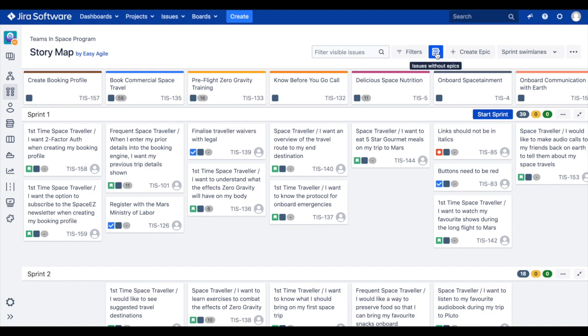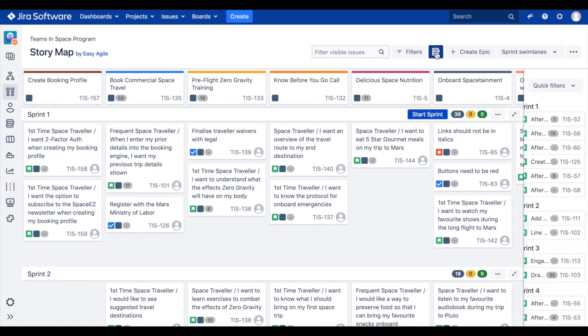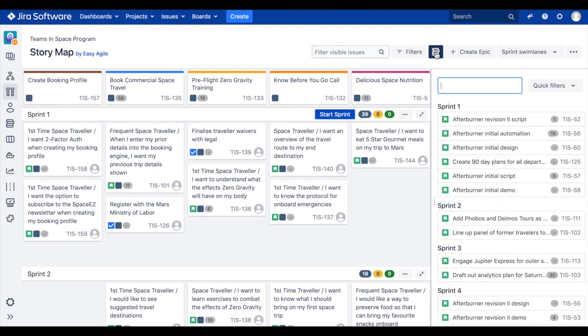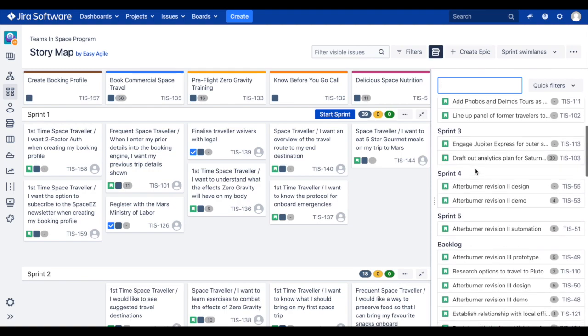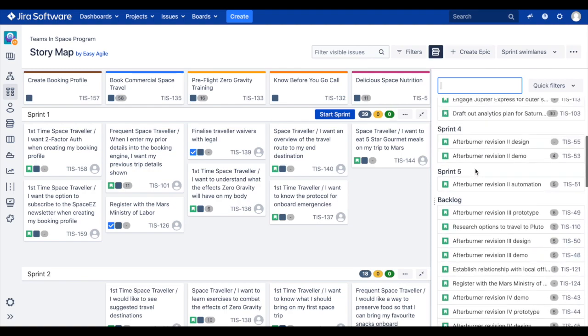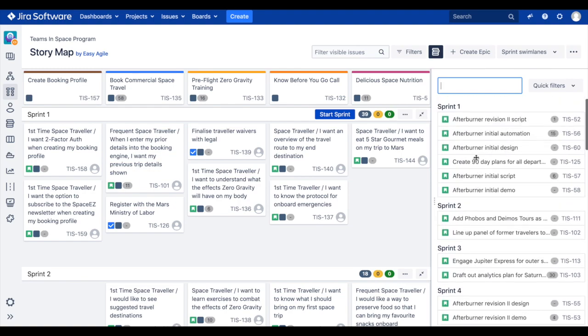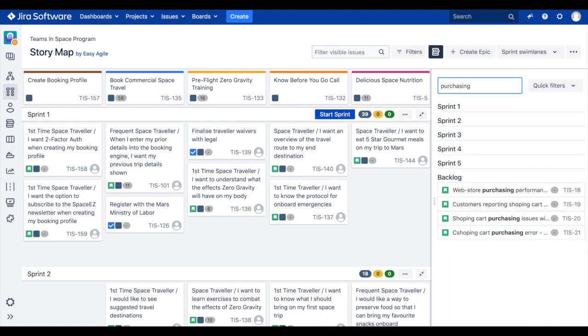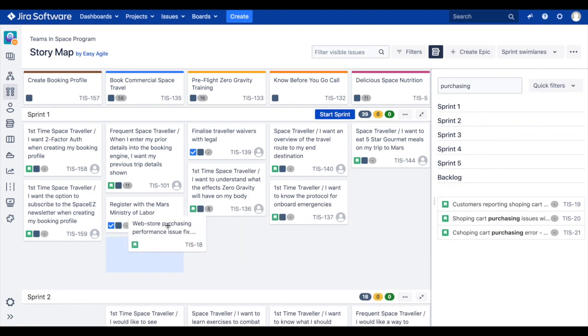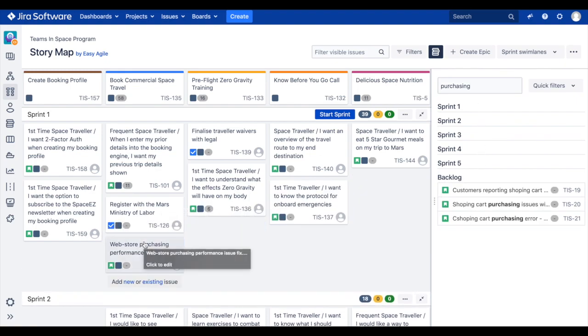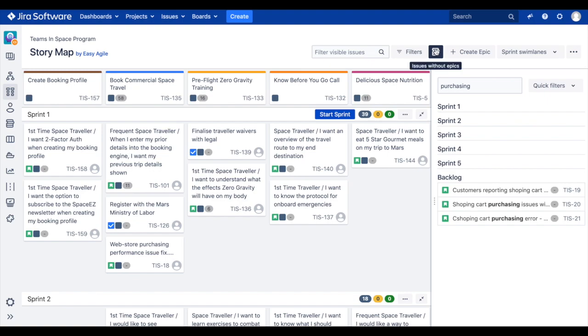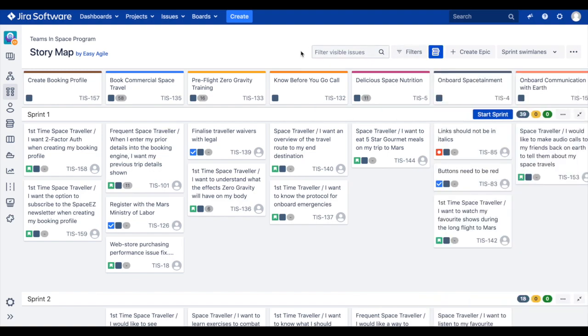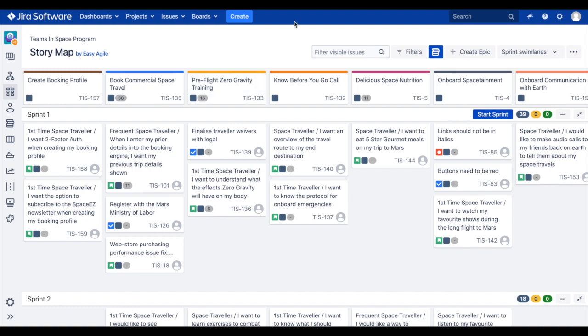Clicking on the blue backlog icon in the top right of your story map will open this panel. You can search for issues in this panel by keyword, issue key or quick filters and multi-select drag and drop them onto your story map. Dragging an existing issue from your issues without epics panel will link the issue to the epic it sits under and schedule the issue into the respective sprint or version depending on which swim lane it was dropped into.